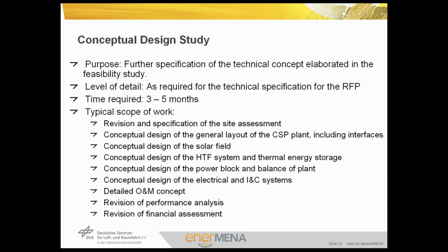The conceptual design study should be done in case the procurement strategy of a project is decided to have the EPC project structure, because it's the client's obligation to analyze the techno-economic constraints on behalf of the future bidder, in this case the EPC contractor, and to define it properly. What are the technical requirements? What are the operation requirements to be considered by the EPC?